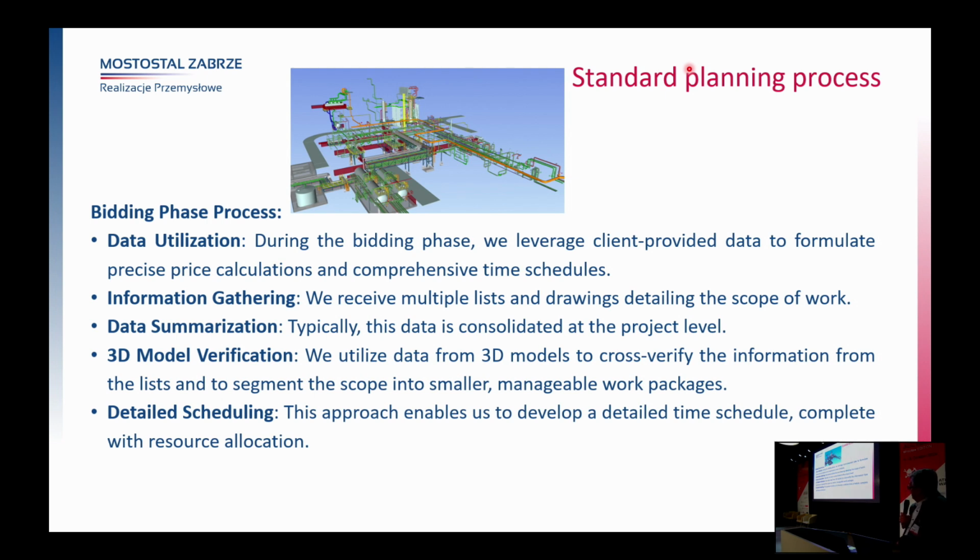And that's why we developed the way how to extract the data from 3D models. And in that way, we cross-verify the information provided by the client. For one of the projects, we knew from the 3D model that the number of pipes will be 30% more than they gave us information in the Excel spreadsheet.